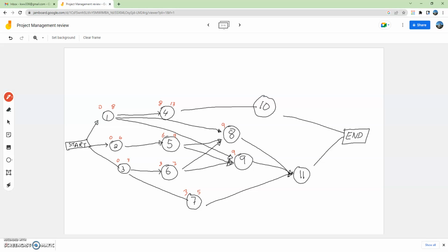If it starts at, say, time period 7, which is when activity 6 would be completed, activity 5 is still not completed, nor is activity 1. So that's why for activity, the predecessors is the maximum time for all the earliest finish times. Let's go and complete activity 8's schedule.